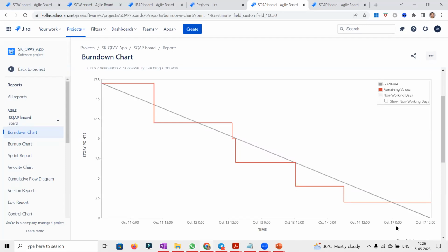I think in the initial days itself, those holidays might not have been taken care of, so that's why it spilled over. Might be our risk was not raised when it was supposed to be. So I think those are 2 things I can guess. During capacity planning, we are not taking care of the holidays. That also might be. Fair enough. Yes, that also could be one of the reasons.